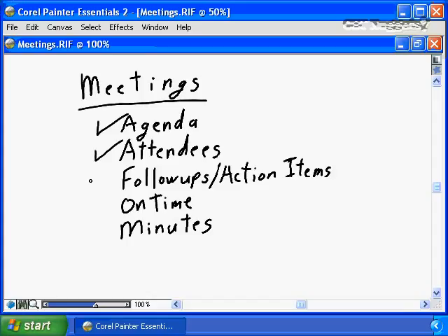As you're going through your meeting, if items come up that cannot be resolved in the meeting, if items come up that need additional information, if items come up that two people in the meeting should review and discuss and present a recommendation, generate follow-ups, generate action items. Do not drag a meeting down while two participants in the meeting have a 10-minute discussion on how to resolve something. Give them an action item.